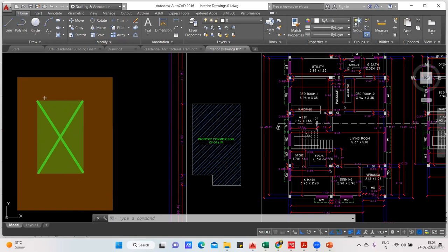What we are supposed to do is know the length of this and the breadth of this. If I multiply both, I'll get the area. That area itself will be my clearing area, and that area will help me to get the quantity. For that, I'll multiply by the rate. I'll get the total cost that will be involved here, right? Very simple. This much you understood.